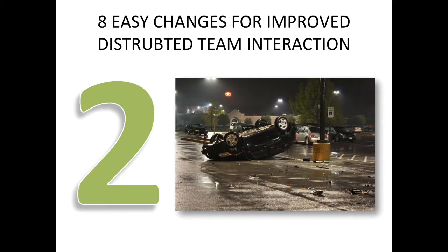Number 2, parking lot. So at the end of Standup, have a time designated for what we would call parking lot time, or time just to discuss any outstanding problems, the status of the work items in process, or any other concerns that need to be resolved. This is also a good collaborative time. Also, stakeholders could use this time to discuss concerns they have with the project.